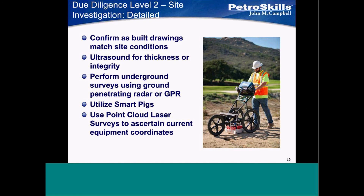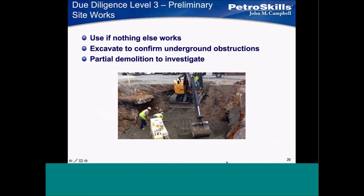And the last thing is: if you can't confirm everything you need to, then you may need to do some site works. Excavation is a typical one. Or taking a vessel or heat exchanger out of service for a short period so you can take a quick look or do a quick test. It's going to be very difficult to do any of those things unless you have a good reason beyond 'I think we ought to do it.'